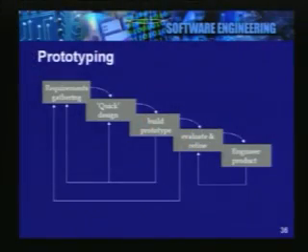When the evaluation leads to clearly defined requirements, then we are ready to build the product, and this is done using the standard engineering approach. So, product development takes place once the prototyping cycles are gone through and we have come to a clearly defined requirements document for the final product.